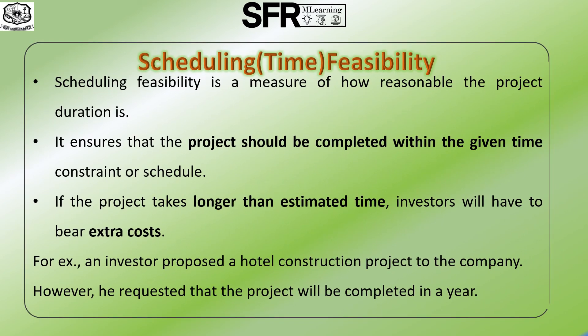The last type of feasibility study is Scheduling feasibility, otherwise called time feasibility, which helps to measure how reasonable the project duration is. It ensures the project should be completed within the given time constraint or schedule. Completing a project on time is very important from an investor's perspective — if the project takes longer than the estimated time, the investor will have to bear extra cost. It also verifies and validates whether the deadlines of the project are reasonable. For example, an investor proposed a hotel construction project to his company and requested it be completed in one year. The project team then conducted a feasibility study based on a list of requirements to complete the project on time.